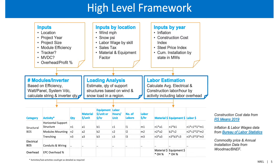For instance, in order to estimate the cost of a PV installation project, the major items we would like to figure out are: how many modules and inverters are required, how much space is available for installation, how much material we would need for the racking structure, and how much labor it takes for different construction and electrical activities. It is important to collect all the inputs in order to estimate all the major functions in those activities.